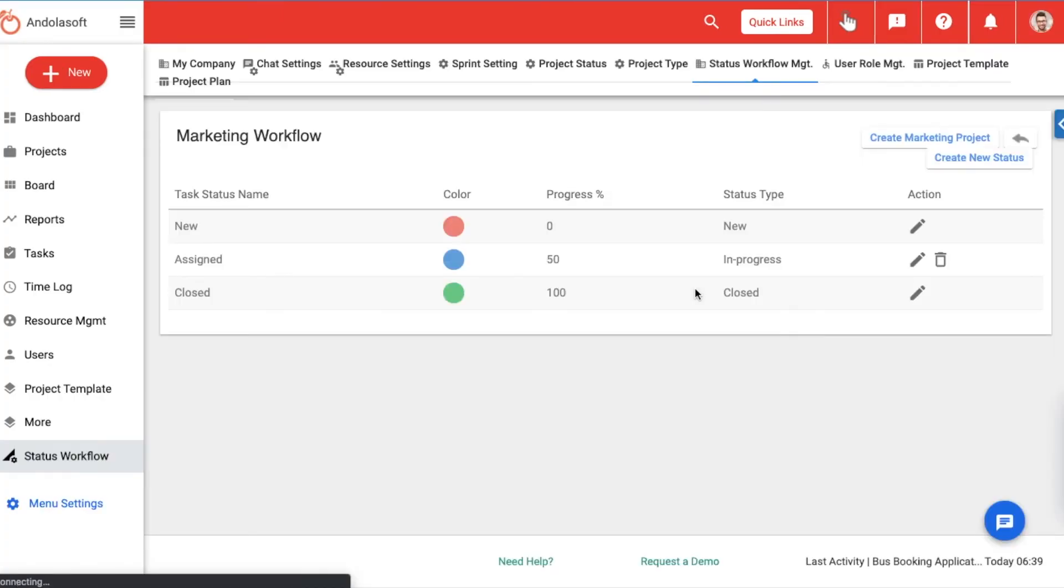Note, by associating a percentage, you indicate the expected progress of the task when it is in a particular status. Also, when you update the status for a task, the progress gets automatically updated.